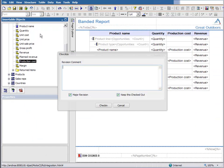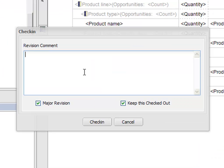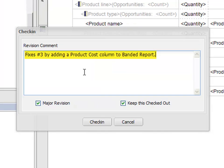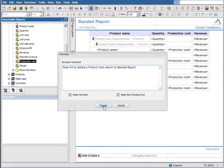I'll use the phrase 'fixes number three' along with my own description of the changes. This phrase triggers Modio CI to associate my changes back to ticket number three from Jira.